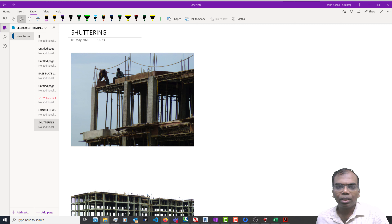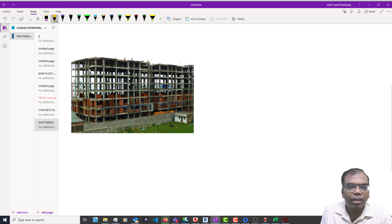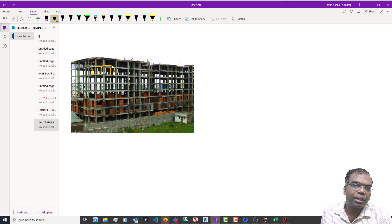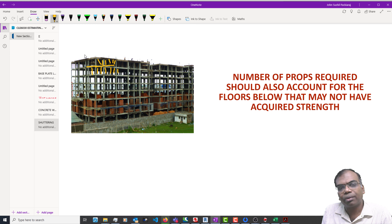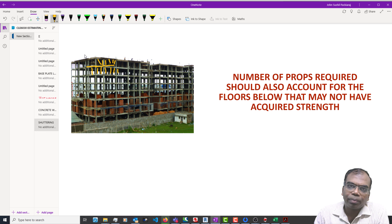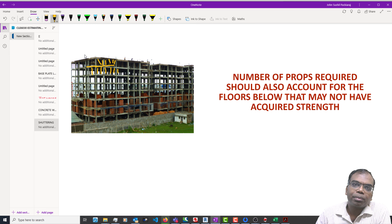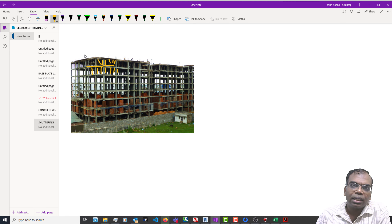If you notice here, this is a multi-story building for which people are just starting to do the shuttering. You will probably have to keep the props at the floor below for some more time till this slab gains strength. After that, you can remove it. The number of props which you will require is slightly more than what you typically work on. You should always remember that only after the floor below has gained the target strength can you go to the floor above.